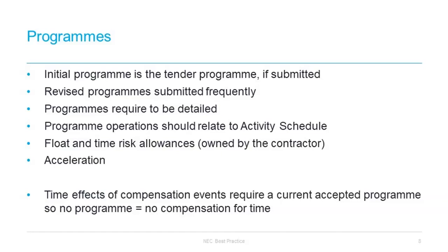If the contractor fails to submit an initial programme, clause 50.3 requires a 25% retainer on payments to the contractor for work done until there is a programme in place. And it is not very clear whether this requirement falls away once a first programme has been submitted for acceptance by the contractor, or if this only falls away once actually accepted by the employer. This should therefore be avoided if possible.